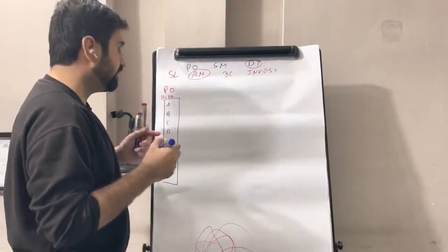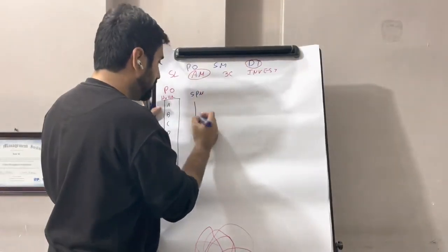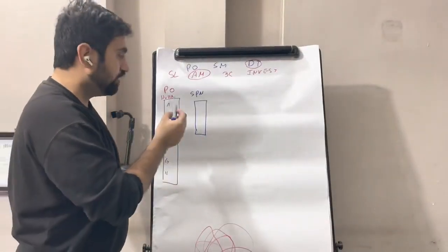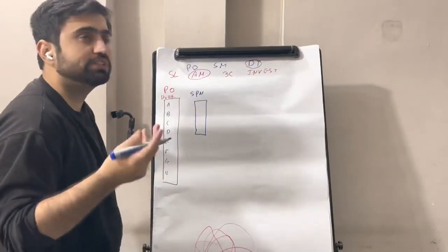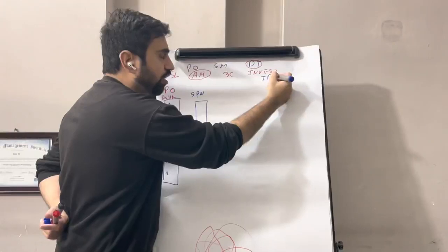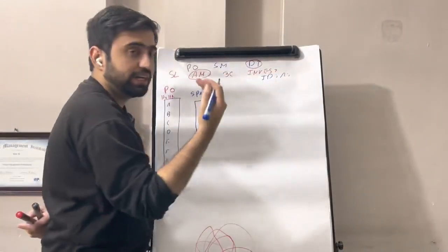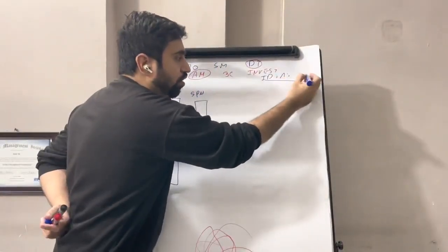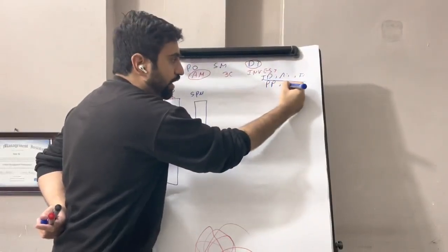Then the development team comes, the Scrum Master comes, we have the sprint planning meeting, in which in the first sprint planning meeting we put the story points on all these things. Story points can be put using various techniques like ideal days, affinity estimation, small, medium, large, or the Fibonacci series: 1, 2, 3, 5, 8. In order to get consensus on these techniques, we use planning poker and wideband Delphi.